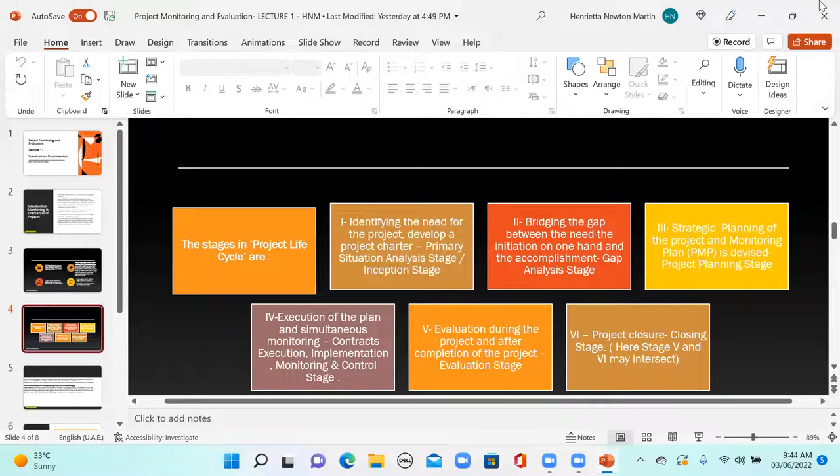But everything does not end there. Apart from that, legally speaking, there is a duration, say 1 year or 2 years, where the employer, the one who calls for the project, would say that in case there is any problem, you will have to come and redress the issue. There is a kind of guarantee or warranty period. Normally in projects there are warranty periods, say 1 year or 2 years, depending upon the project and the component of the project. Within a period of 1 year, you come and sort out any issues that may happen.